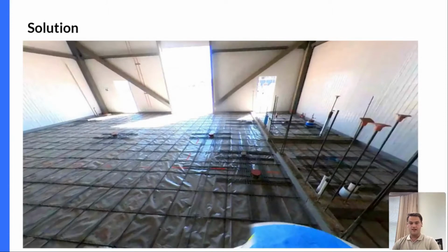So one thing our design team used was Reconstruct to tell us if this was going to be correct, because if we didn't have enough space, we couldn't put a goalpost in before a roll-up door, or we'd have to change it to a bollard. Along with what Nick was saying, we'd have to do costly cuts to the floor. It would look like an unfinished product, and it would extremely damage the strength of the floor as well. It being a warehouse, we needed at least 7,000 psi for the floor. So it was a huge benefit for Reconstruct to help us make sure that the flooring was going to be correct, along with making sure that the embeds were placed correctly.